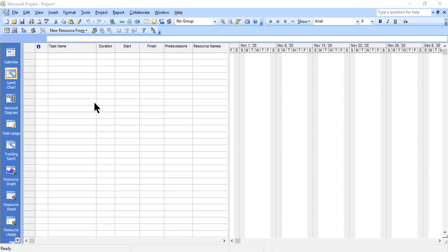So we can see the benefits practically now. You only do one work and the rest will be done by the computer. That's the beauty of the software. I'm going to begin by entering the details of my work breakdown structure of a particular project that I want to demonstrate. Where it says task name, that's where you put the task. I'll be using letters, so I'll call this task A, and this task has a duration of 5 days.